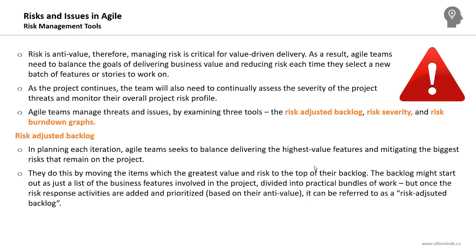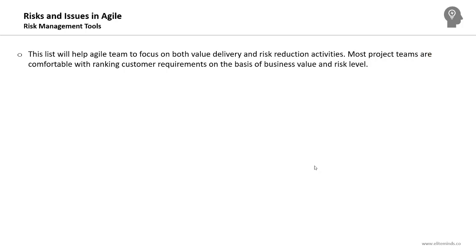The items with the highest impact and highest value will be on the top of the backlog, meaning they have the highest priority. The backlog might start as just a list of business features divided into practical bundles of work. But once risk response activities are added and prioritized, it can be referred to as a risk-adjusted backlog. This list helps the agile team focus on both value delivery and risk reduction activities.